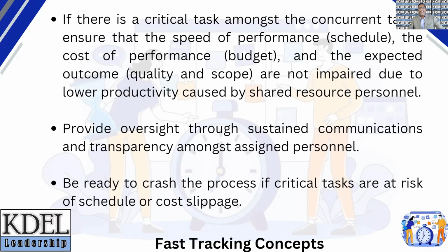We should then identify idle resource persons in other task assignments that have some slack, and then reassign them to the urgent task for at most the duration of the slack available. We should be careful not to take resource personnel away from their original tasks for longer than the available slack in their initial task assignments. For example, activity D has a slack of 3 weeks. So we must not reassign its resource personnel for more than 3 weeks.